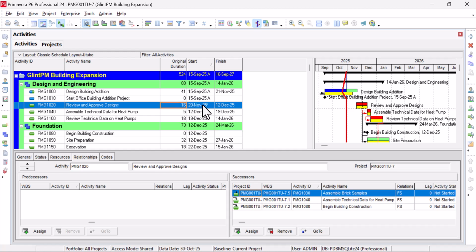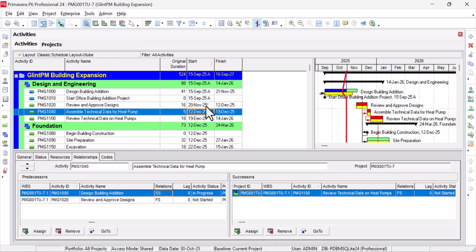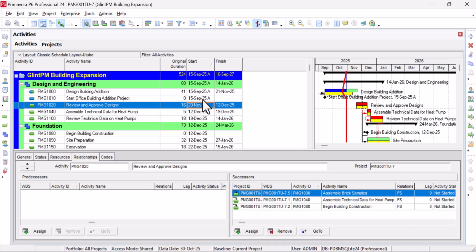If you do it like this, always consult with the project team if they want it. If they want it, you have to make sure you comply with what your team and the client are comfortable with, or if that is the only choice that's available. But for good practice, it is better to avoid the use of constraint. Allow the logic to drive the date.